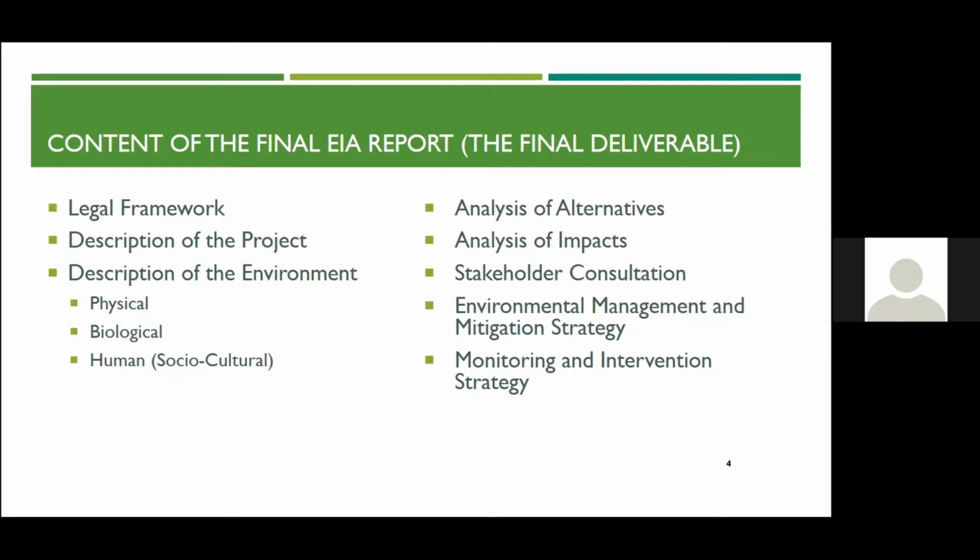In terms of analysis of impacts, this assesses the potential impacts of the project. The impacts are classified using a structured system and considers the current baseline conditions. And the potential for cumulative impacts are also determined. Stakeholder consultation, this is currently underway with CARI consultants leading that task. This is only one of 2 meetings. This is the first public meeting, and the second one will present all the findings of the EIA.